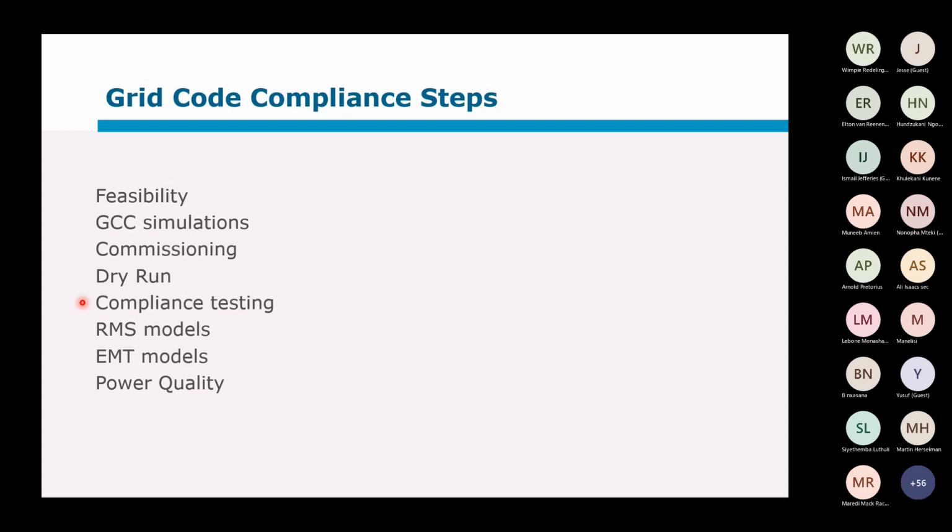So during this stage, in that 6-month window that we spoke of earlier, you're going to look at the power quality. Somebody's going to measure it and assess it against the requirements in the grid code. That report will be submitted to you as the distributor, because RETEC doesn't sign off on it.